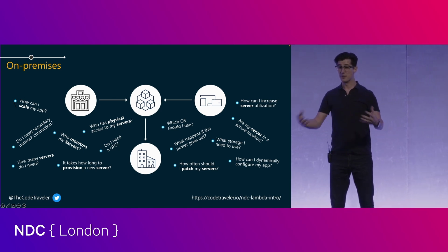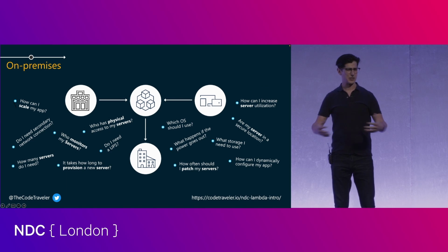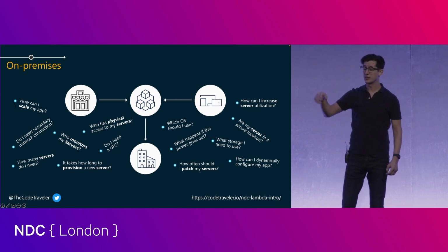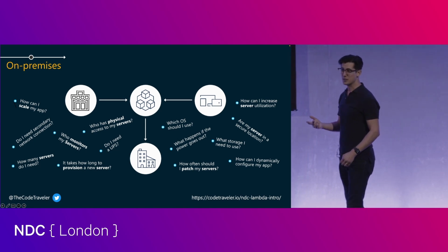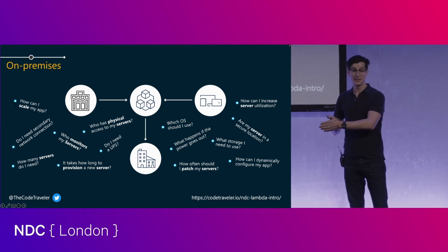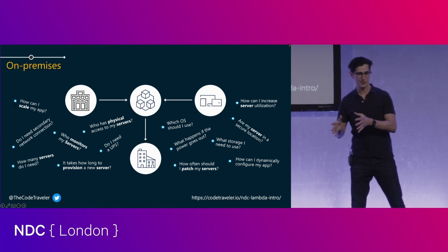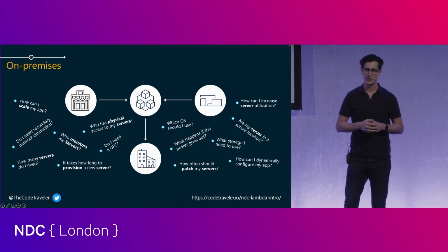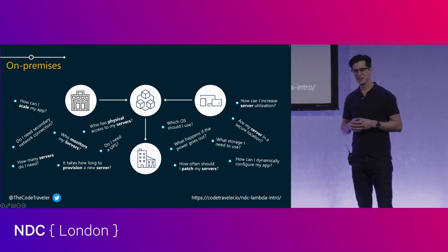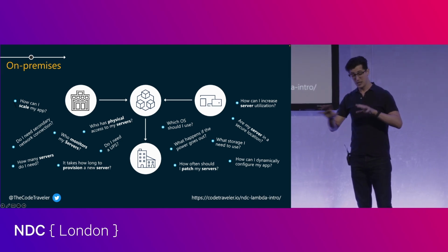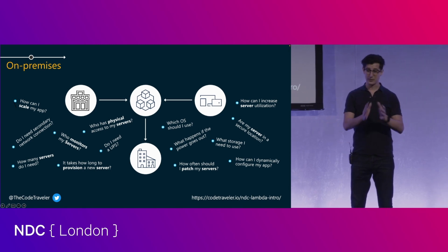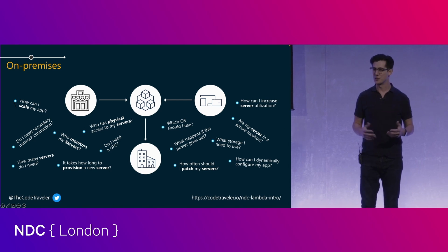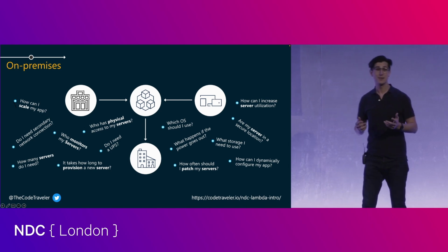And on top of that, our workflows, our timelines, we had to plan months, years in advance if we just wanted to publish a new app, because we had to plan for that 2-month lead time for the server to come in. We had to plan for about a week or two to get that server up and running. We had to do security audits. And so it wasn't simple, and anywhere along the line, any part of that chain could break, and then all of a sudden we're slipping our deadline for publishing our new app for weeks, if not months, if not years.